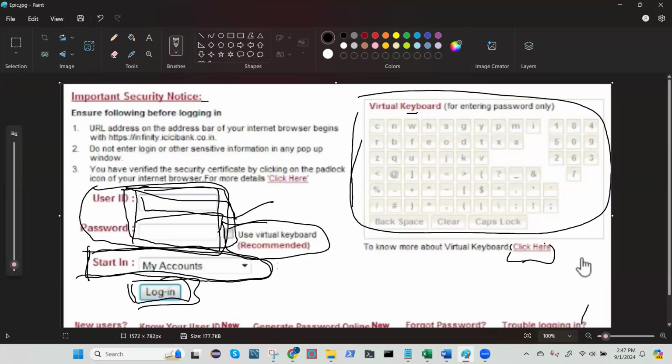What we can do within the committed 15 days. Okay. For that sprint, we want to work on this, because that's the first thing to do. What? To implement a login script module. That's our epic. And that epic, we're breaking it down. I call it about our capabilities and our team restructuring. So you can say that for the next 2 weeks, I will develop 5 stories.